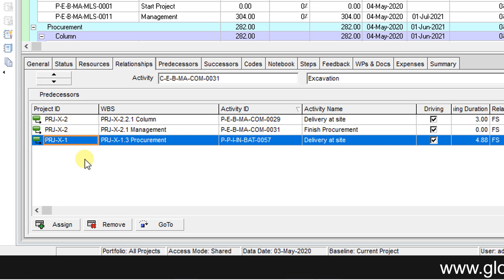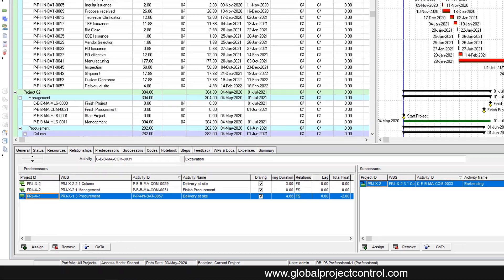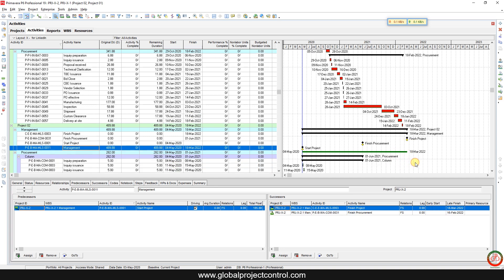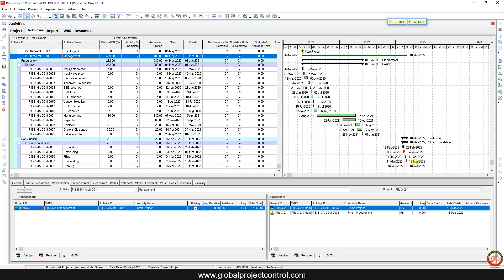You can find that this relationship belongs to Project One, and these two relationships belong to Project Two. It's not easy enough to identify that your project includes an external relationship. If you go to Schedule and schedule the project, you can find that the project duration has changed. Looking at the Gantt chart, the activity has been updated and reflected in the schedule.